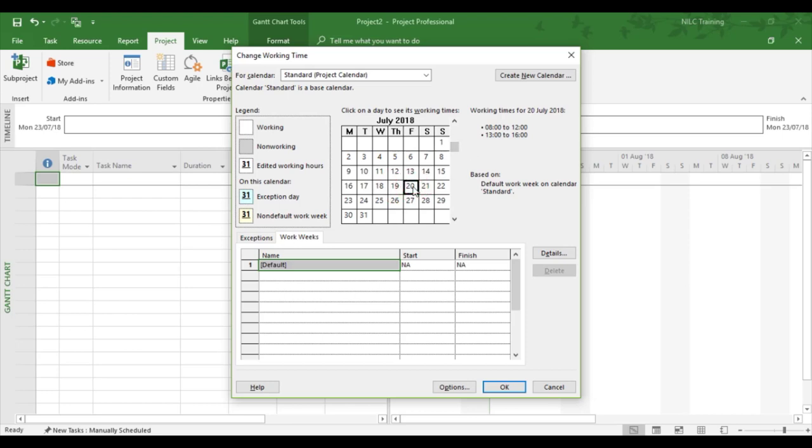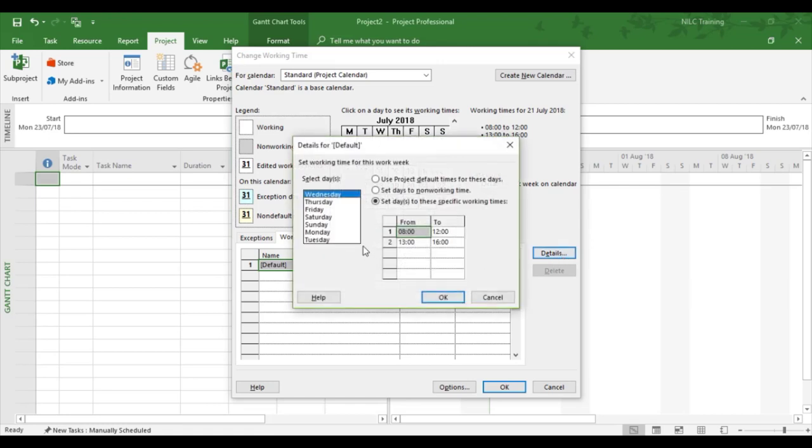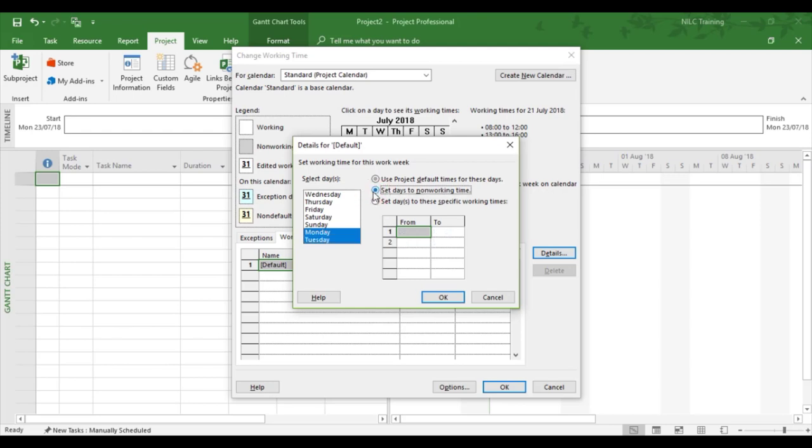So now we need to update the non-working. So same idea: work weeks, default, details. And this time Monday and Tuesday, I'm going to set to non-working.